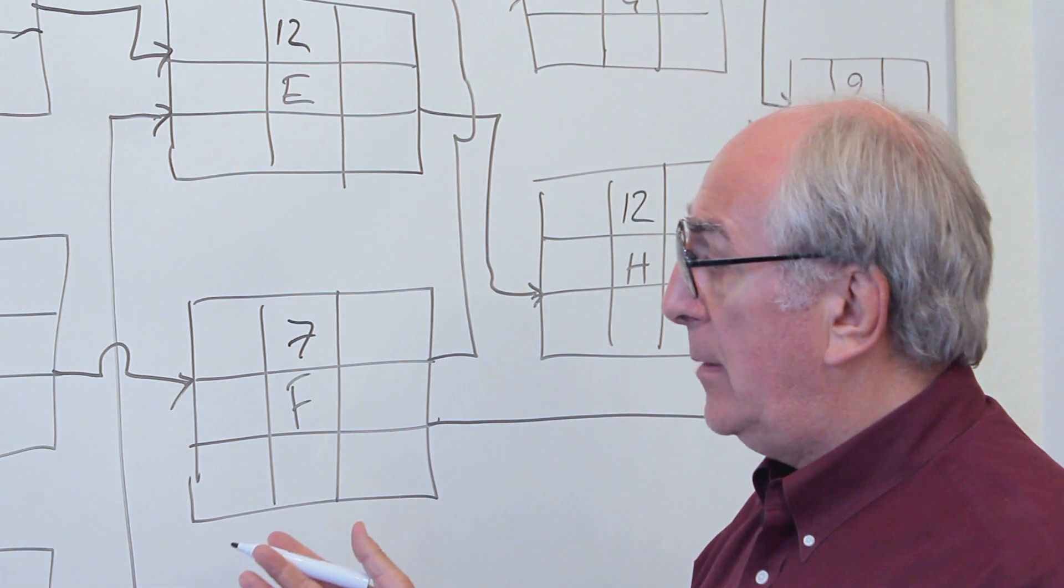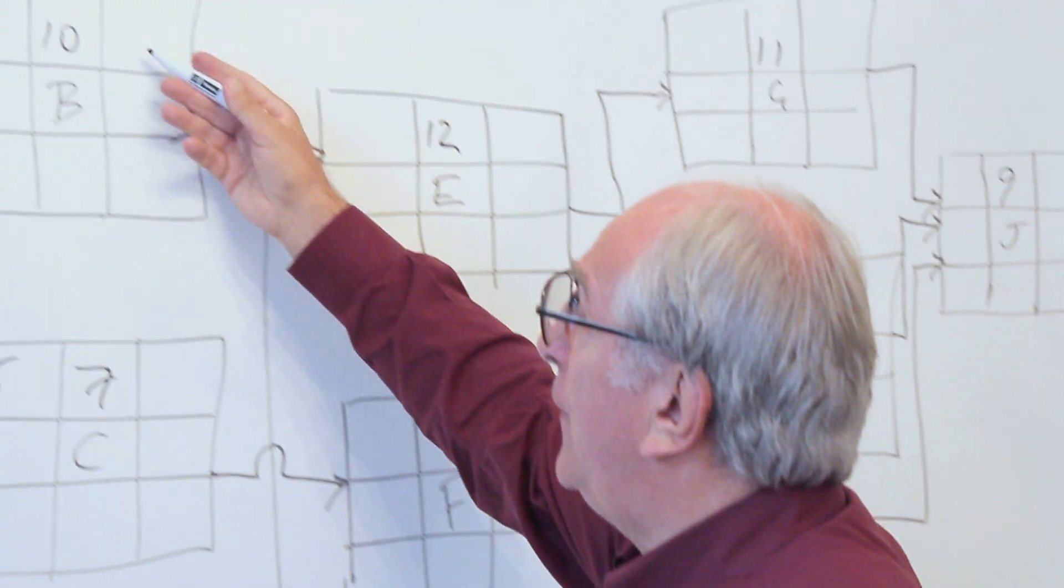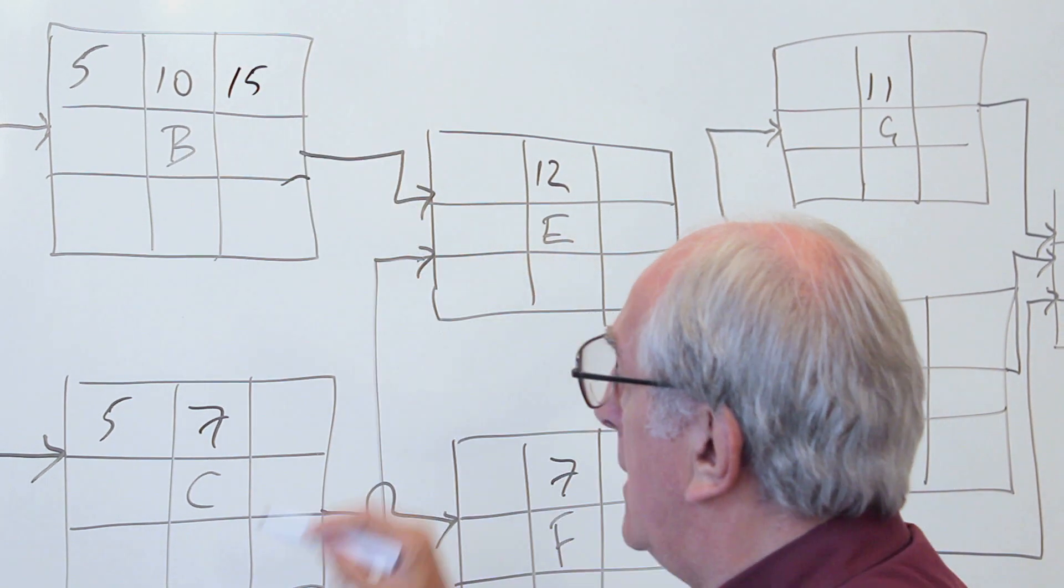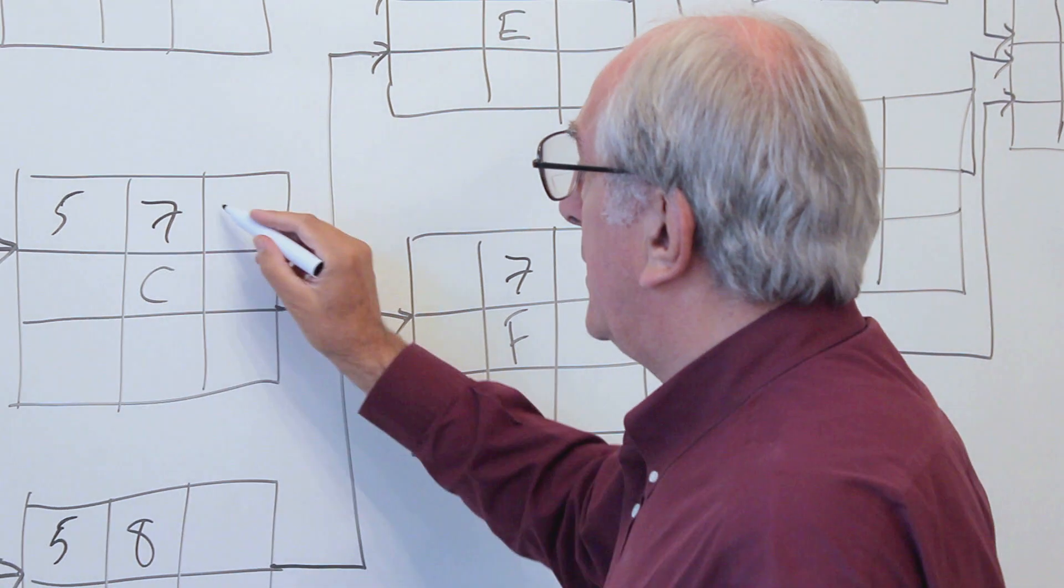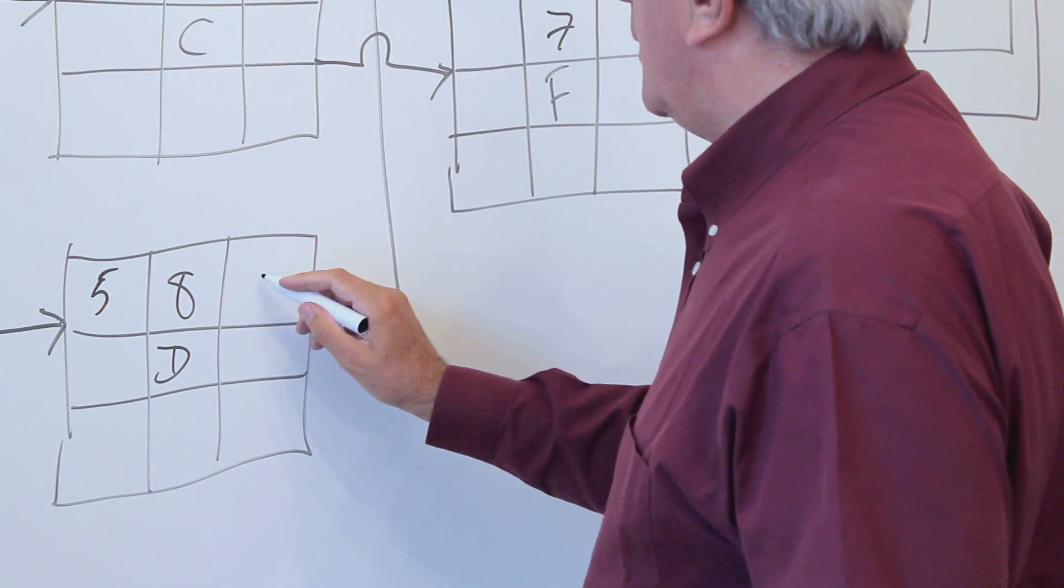That gives us the ability to move on using that equation to show that the early finish for activity B is five plus ten equals fifteen. For C it's five plus seven equals twelve, and for D it's five plus eight which would be thirteen.